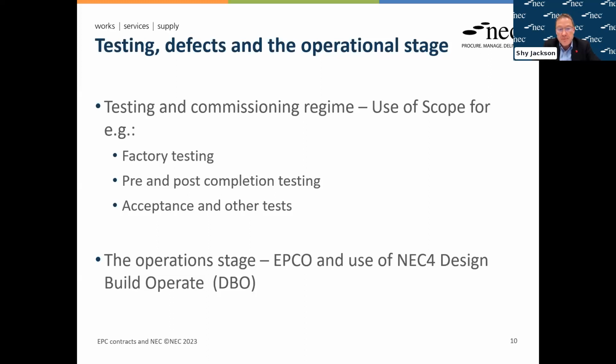It will usually be set up in the scope, but I guess the other point to mention is, and when Peter was speaking about the program, that these are the sort of activities that you need to make sure are included in the program and are properly detailed out so that the client has a full understanding of how the commissioning process is going on and how the testing is progressing. And I've said it has to be in the scope.